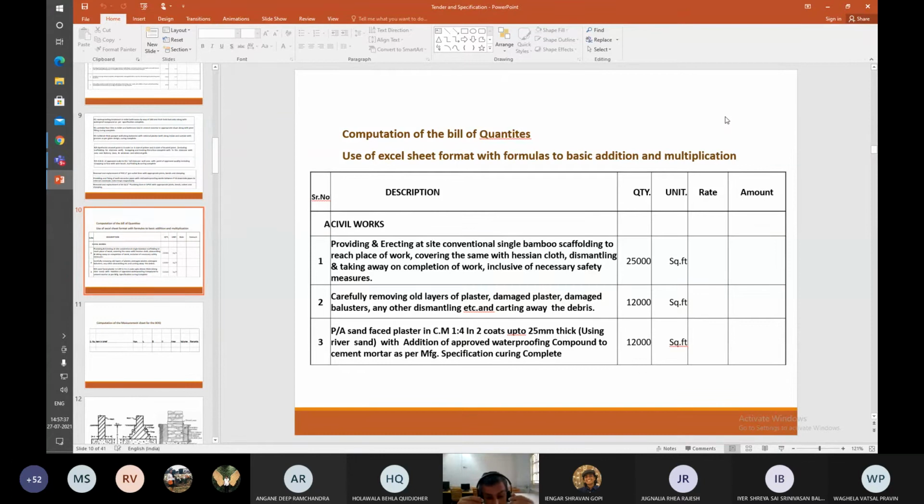You have to make one slot for 2 meters, one separate slot for 3.5 meters. And what else will you write? Excavating up to that level. Then what else is to be ensured? When one digs below the ground, what has he to ensure? To get the water out.